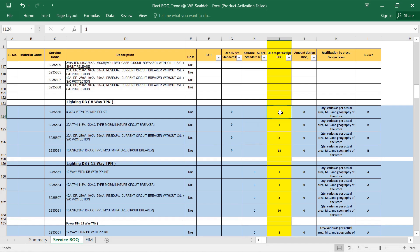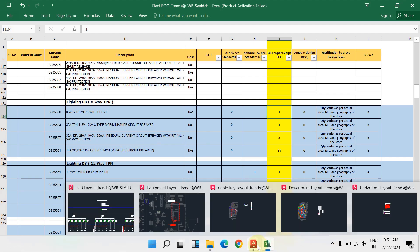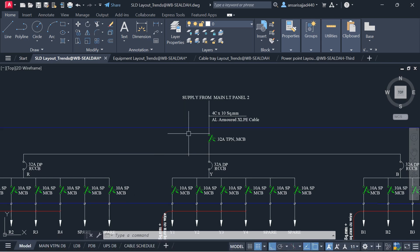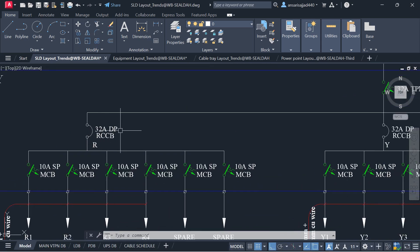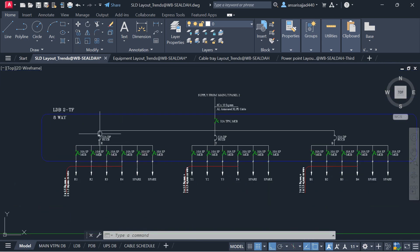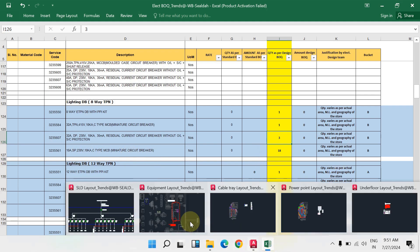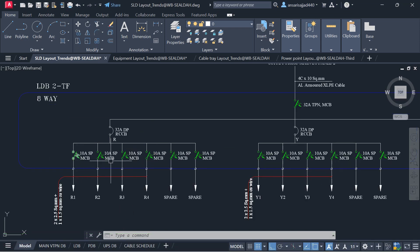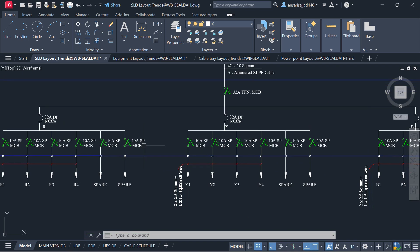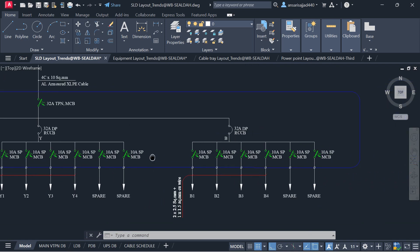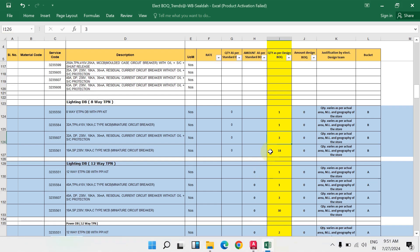For the 8-way TPN DB, the 32-amp double pole 230V RCCB quantity: open the SLD and you can see 1, 2, 3 — write down quantity 3. Then for 10-amp single pole MCB, open the SLD layout: 1, 2, 3, 4, 5, 6 — six here, six here, six here — total 18. I have written 18.